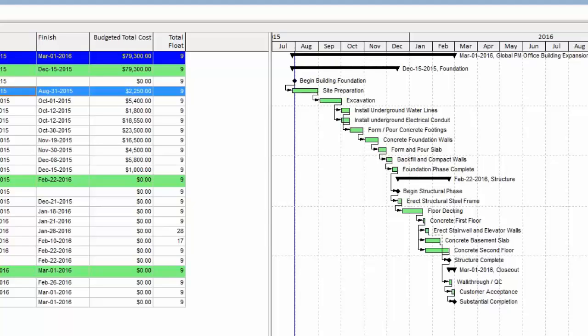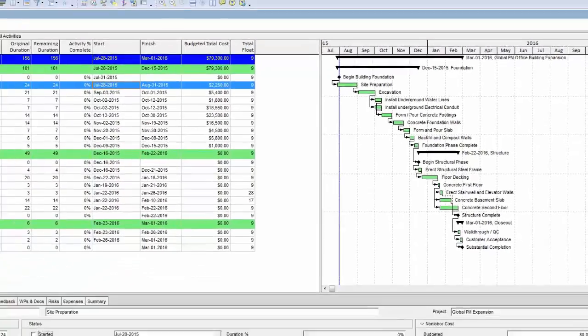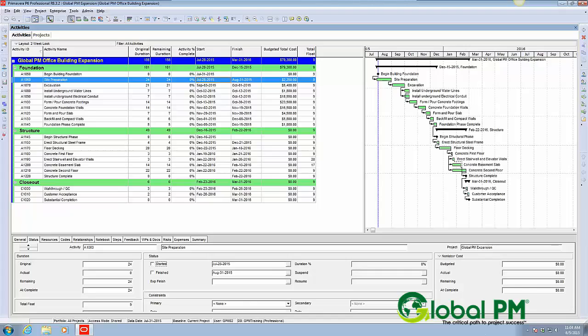We'd still like to see that longest path, the critical path to us, the driving path of the finish date as red. And this is how we go ahead and change that calculation.